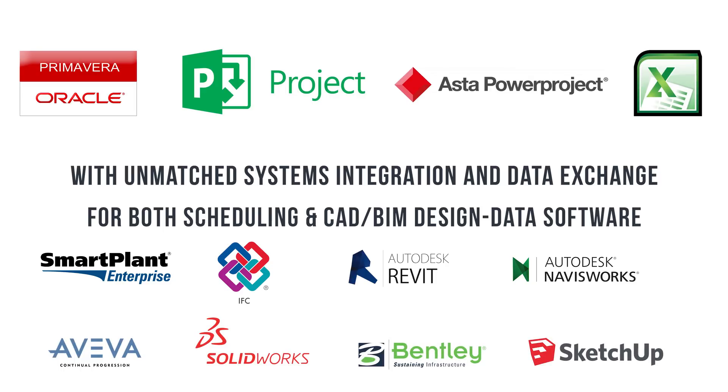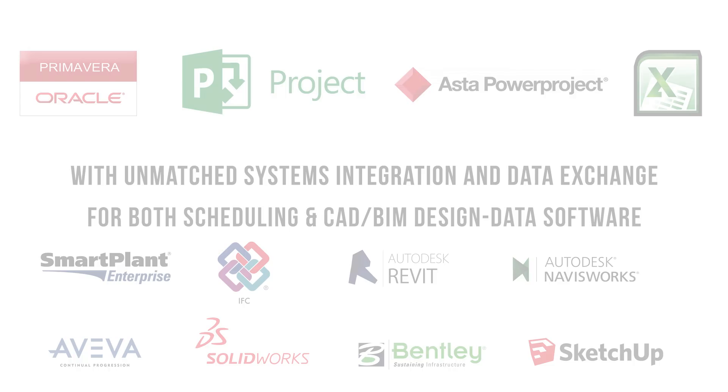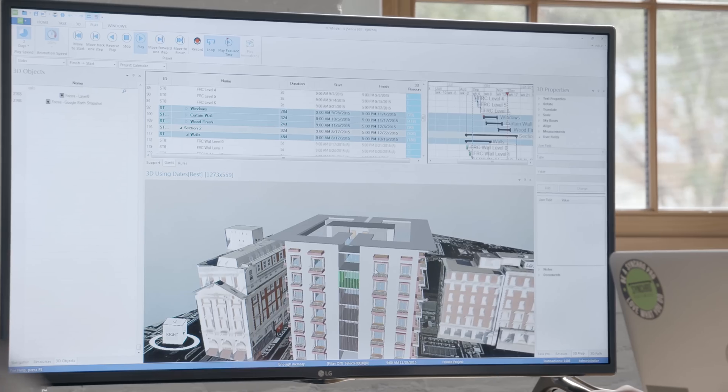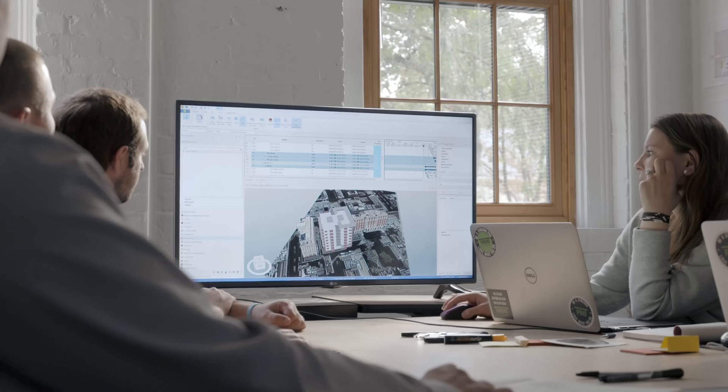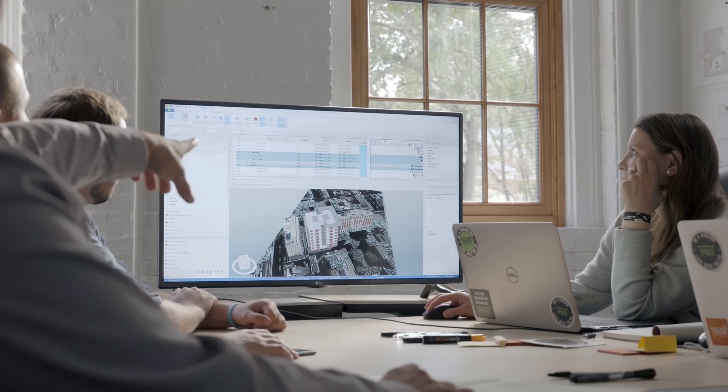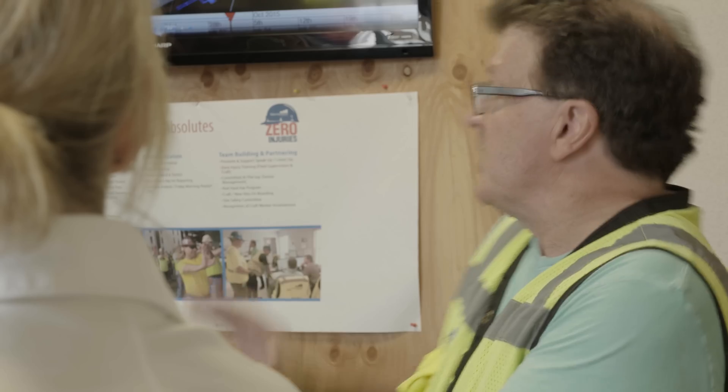Synchro gives the guys who are going to do the work a solid understanding of what the schedule means. We bring in the experts in the field, they tell us their challenges, we make changes, show them options, and then they confirm — yes, this is what we plan to do.